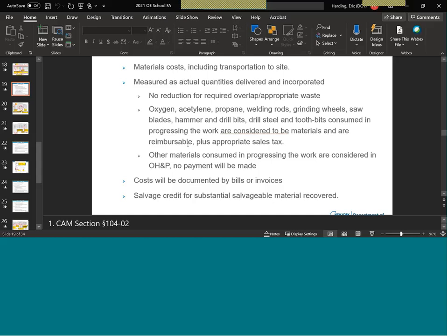Depending on that particular situation, you've got to just use your best judgment. Get with the supervisor of the project, engineer in charge, possibly even pull in the construction engineer to just come up with a reasonable salvage value for that, because a chunk of steel, in a scenario like that, can be used many times.